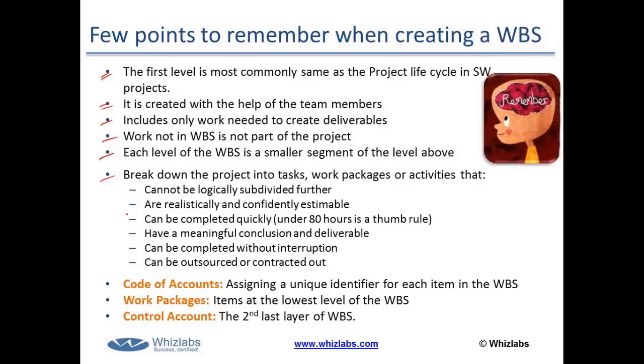The WBS breaks down the project into tasks or work packages or activities that cannot be logically subdivided further, are realistically estimable, and can be completed quickly, within 80 hours as a rule of thumb. It's also considered a heuristic, which is another fancy name for the rule of thumb.